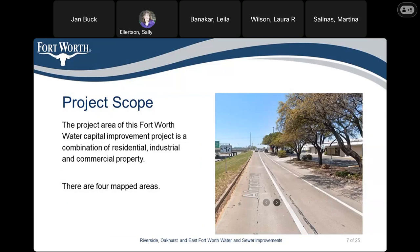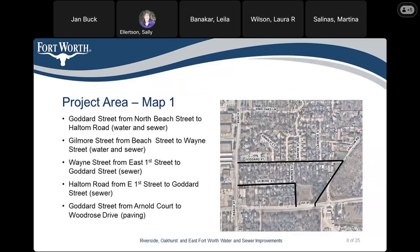The project scope is a combination of residential, industrial, and commercial property, and there are four mapped areas. Map one: Goddard Street from North Beach Street to Halton Road — replacing water and sewer. Gilmore Street from Beach Street to Wayne Street — replacing water and sewer. Wayne Street from East 1st Street to Goddard Street — replacing sewer. Halton Road from East 1st Street to Goddard Street — replacing sewer. And Goddard Street from Arnold Port to Woodrow's Drive — paving.